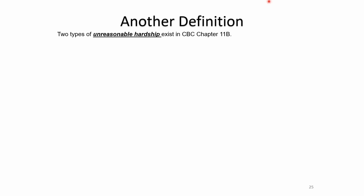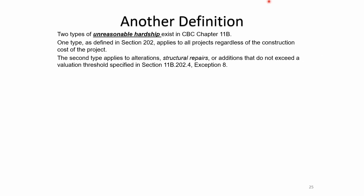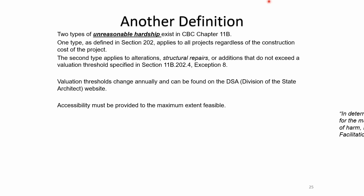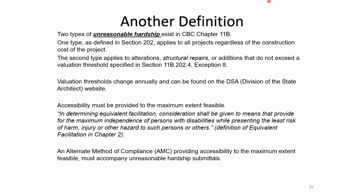There are two types of unreasonable hardship in CBC Chapter 11B. One type, defined in Section 202, applies to all projects regardless of construction cost. The second type applies to alterations, structural repairs, or additions that do not exceed the valuation threshold from 11B202.4. The valuation threshold changes each year — the Division of State Architect is in charge of that. Accessibility must be provided to the maximum extent feasible. In determining equivalent facilitation, consideration shall be given to means that provide for maximum independence of persons with disabilities while presenting the least risk of harm, injury, or other hazard.